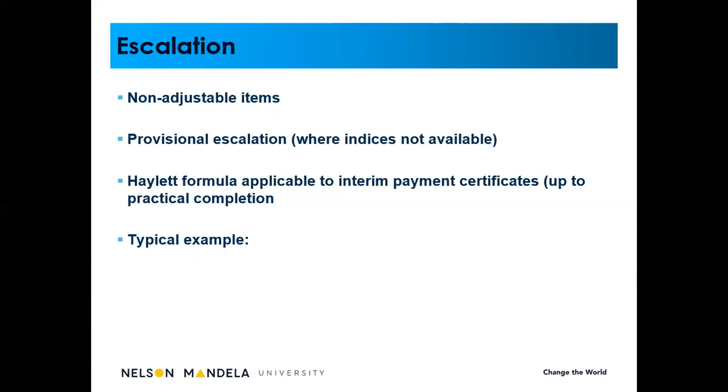In other words, we've got a provisional amount for electrical installation, and on top of that, the contractor will claim profit and attendance. Obviously, the profit goes to the main contractor, because the main contractor will argue and say, I also want a share of the cake. In other words, part of the electrical contract.